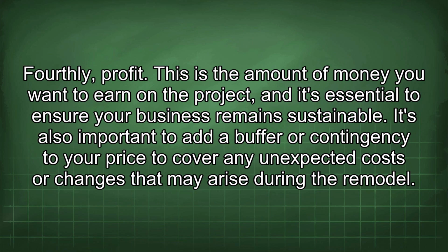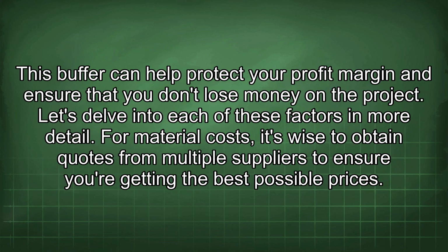Fourthly, profit. This is the amount of money you want to earn on the project and is essential to ensure your business remains sustainable. It's also important to add a buffer or contingency to your price to cover any unexpected costs or changes that may arise during the remodel. This buffer can help protect your profit margin and ensure that you don't lose money on the project. Let's delve into each of these factors in more detail.